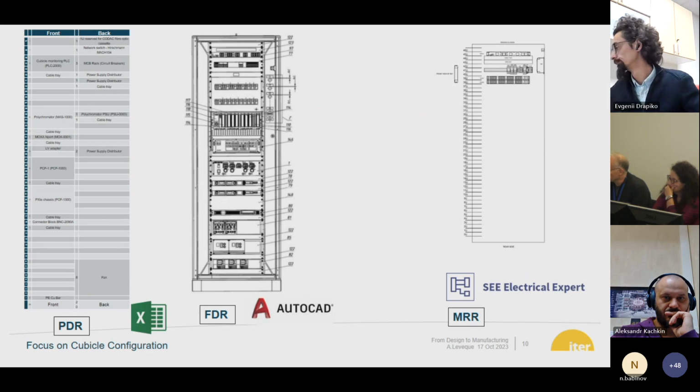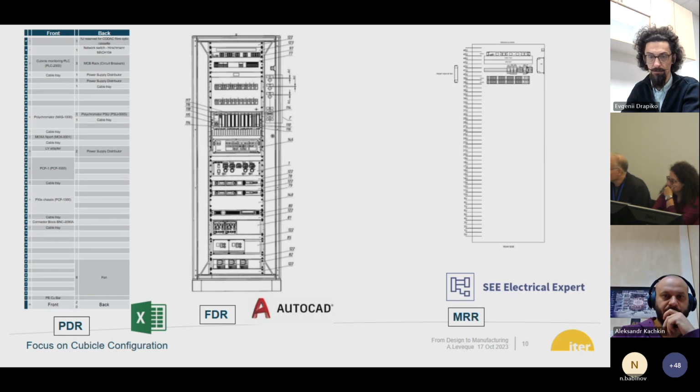That's unfortunate. So I need to discuss with the NX0 team. The process, as I have understood, was that we can declare in the EPCT, the electrical power collection table, any needs that we have. And if you have a need which is not in a cubicle, we should have the possibility to have a direct connection from the BP to whatever is on your table, but it needs to be declared in your cabling diagram.